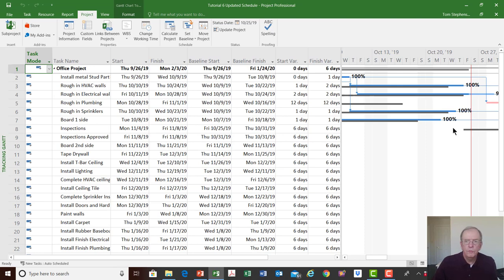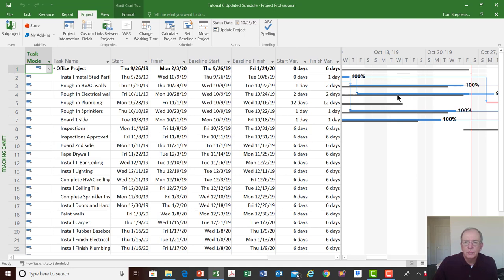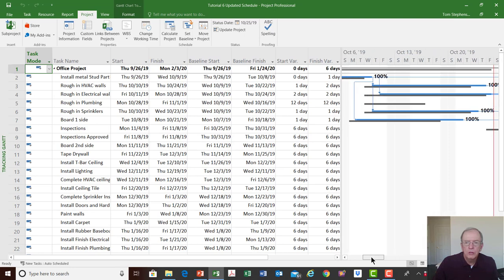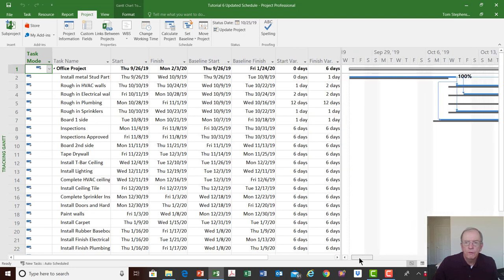One of the other things we looked at when updating was to slide all the way to the left. A big part of this is being able to orient yourself — what screen you're in. Currently I'm in the tracking Gantt screen. The tracking Gantt shows the bottom bar, which is the darker bar — that's the baseline schedule — and the top bar is the update, what's currently happening on your project.